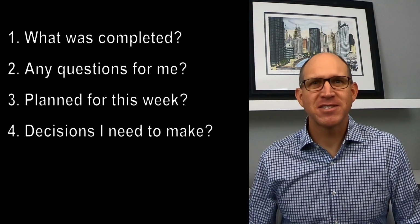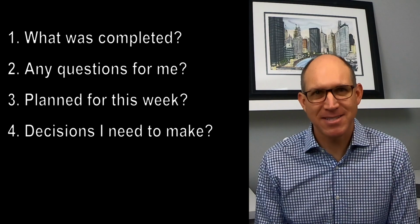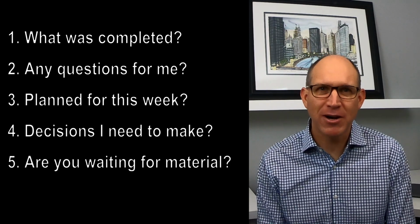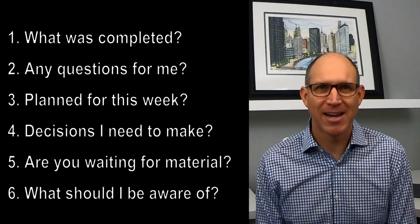Fourth, do you foresee any issues or decisions you need me to make, and what date do you need a decision by to stay on schedule? Fifth, are you waiting for any material that will hold up progress? Sixth, is there anything else I should be aware of or talk to you about today?